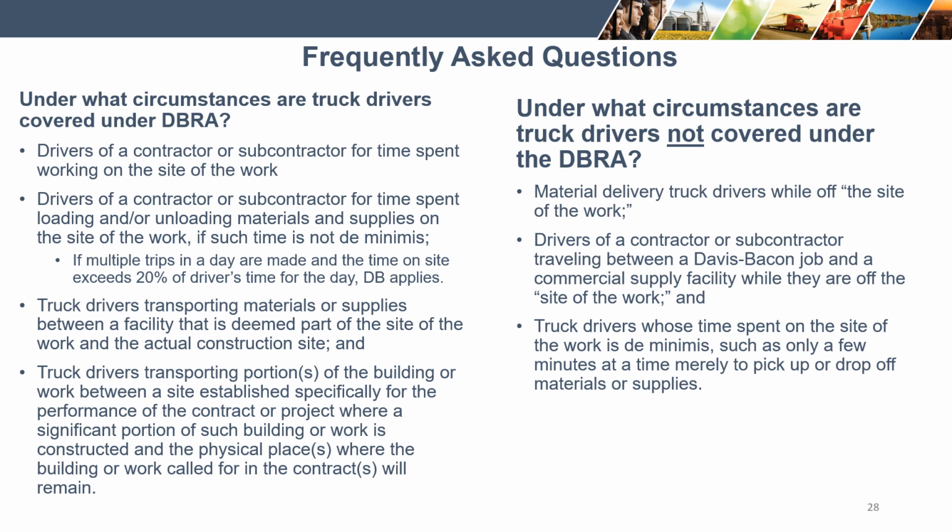Truck drivers. Under what circumstances are truck drivers covered under Davis-Bacon and related acts? Drivers of a contractor or subcontractor for time spent working on the site of the work. Drivers of a contractor or subcontractor for time spent loading and or unloading materials and supplies on the site of the work if such time is not de minimis. If multiple trips in a day are made and the time on site exceeds 20% of the driver's time for the day, then Davis-Bacon applies. Please make note of this.